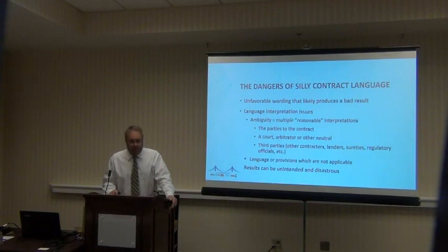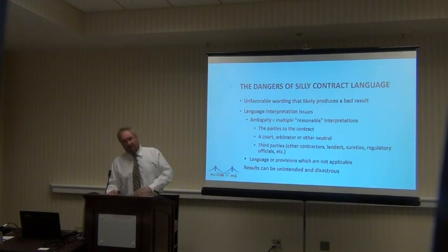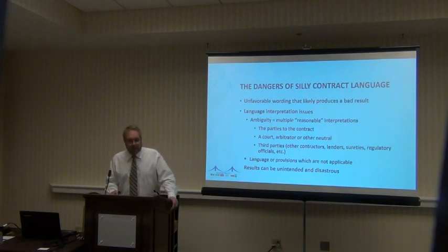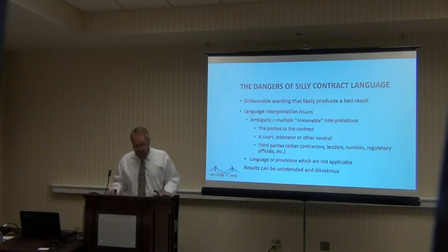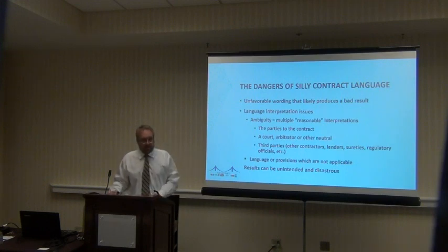And then we're going to see a great example, and I've seen a scary amount of this, where there are contracts that contain whole sections or whole clauses or whole provisions that just don't apply to a construction project. Well, okay, it's easy enough to say, well, N/A, it doesn't apply. Who cares? Just leave it alone. It'll never come up. Well, you'd be surprised. When it comes up, if you have a judge or an arbitrator looking at a contract, I would say, hey, this is the contract. I've got to try to make some meaning out of this. I can't just ignore it. These people signed it, so it's a contract. So I have to pay some attention to it, and if it's relevant to the dispute, I have to try to understand what it's trying to convey.